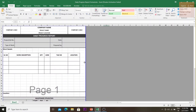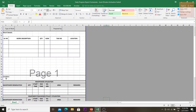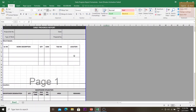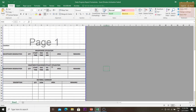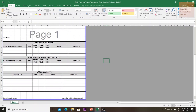This is the template I used in that project. Here you have fields for company name, project name, project location, and job number. Each day you need to record who prepared the report — which engineer or supervisor — and the work details. There is also a general location field, since each team might be doing work in different locations, which you can mention separately.